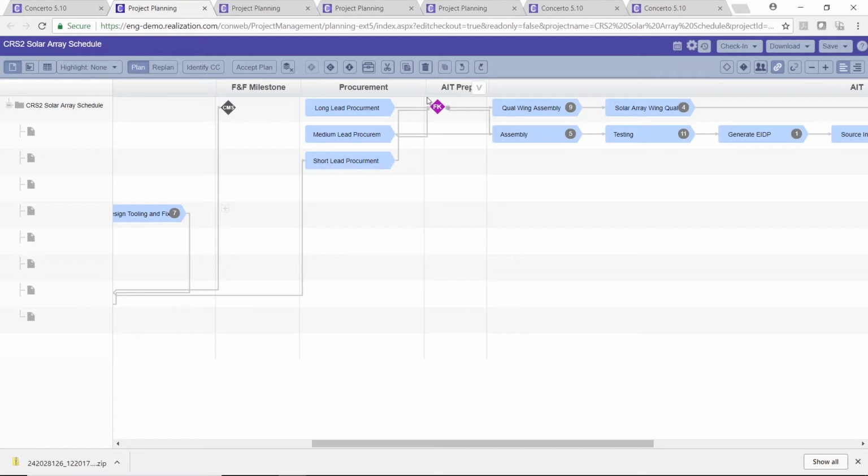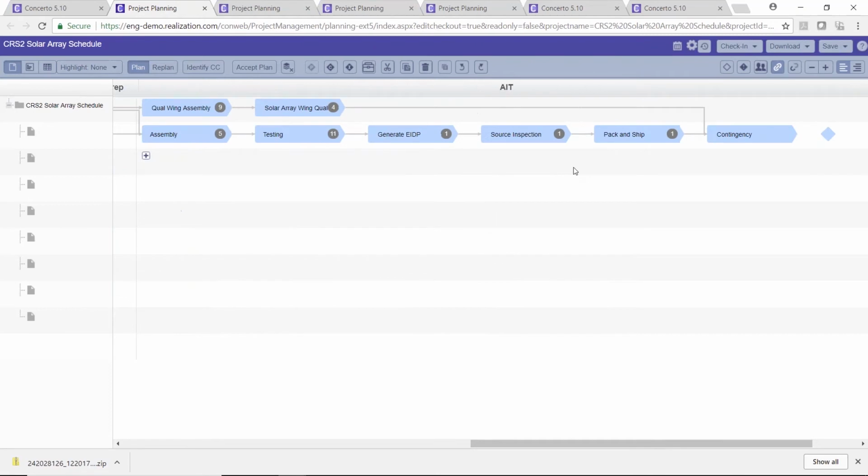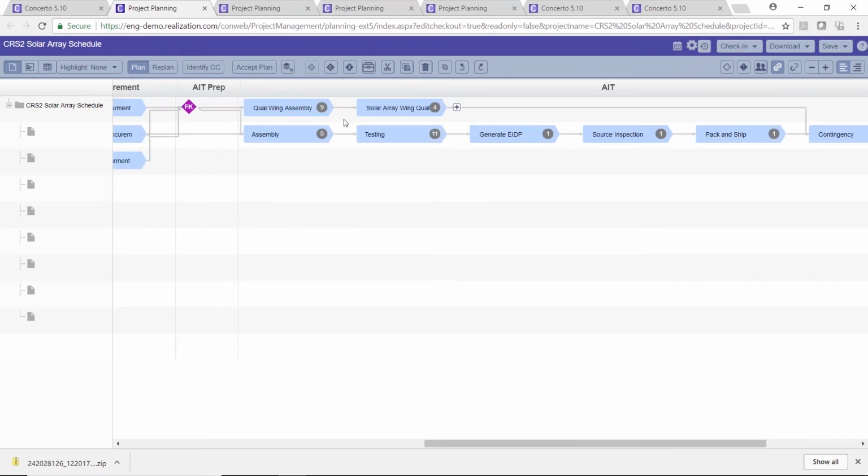So we integrated this idea of full kitting. This is actually a point in the project where we're strategically saying, I'm not going to move forward until I have everything that I need. And this now allowed us, because we have everything, to even begin to group the activities that have to happen in assembly and test, the same way that we did in design. Overall, this project went from about 270 some tasks in total to now less than 40 tasks in this overall project.